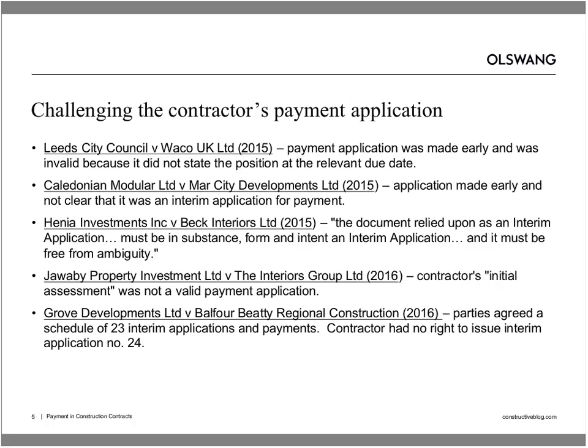Last year we had the Leeds and Waco decision where a payment application was made 6 days earlier than was provided for in the building contract, and the court found that that payment application was invalid. Quite interestingly, in that decision, the employer had regularly processed and paid payment applications that were made 3 or 4 days late.